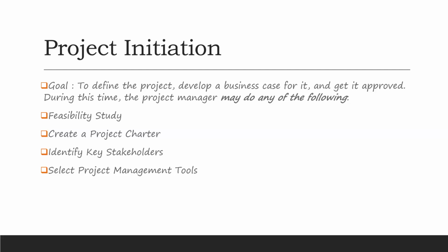Now, there might be a feasibility study. There might be a need to create a project charter. Project charter, I always recommend for very big projects that are long, like 12 months, big, huge implementations that involve change in staff, change in structures, construction, HR. In other words, sometimes we need to restructure the staffing structure because of the new project that we are taking on.